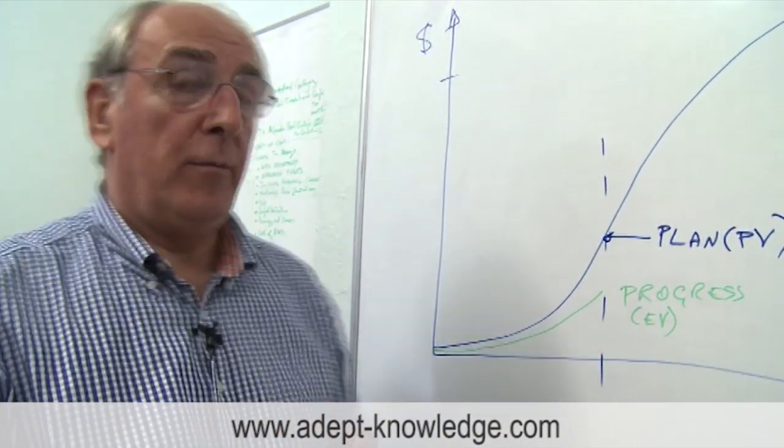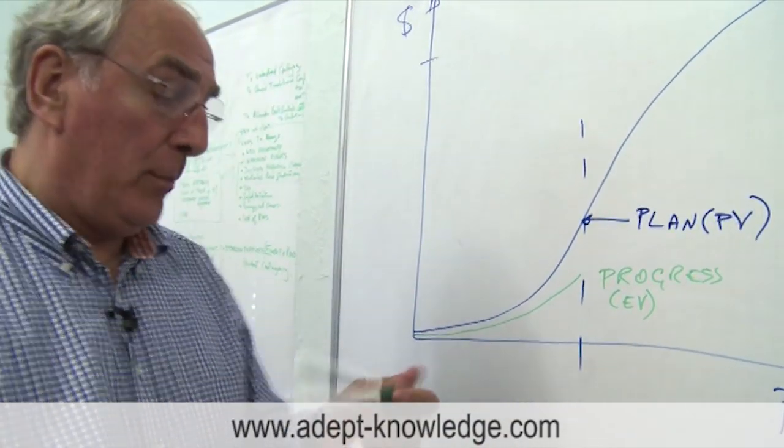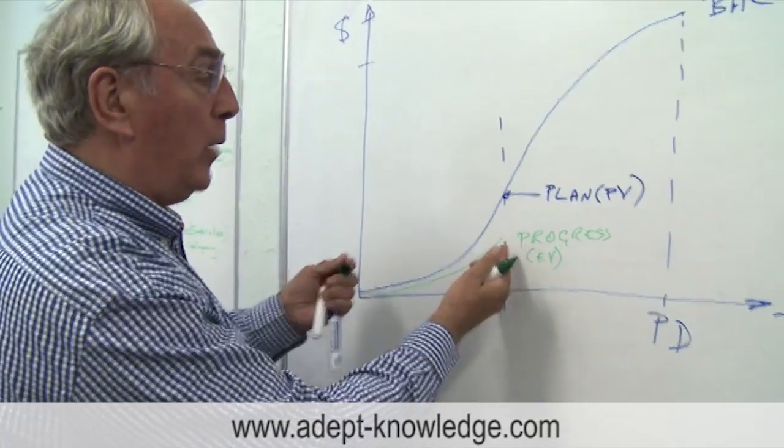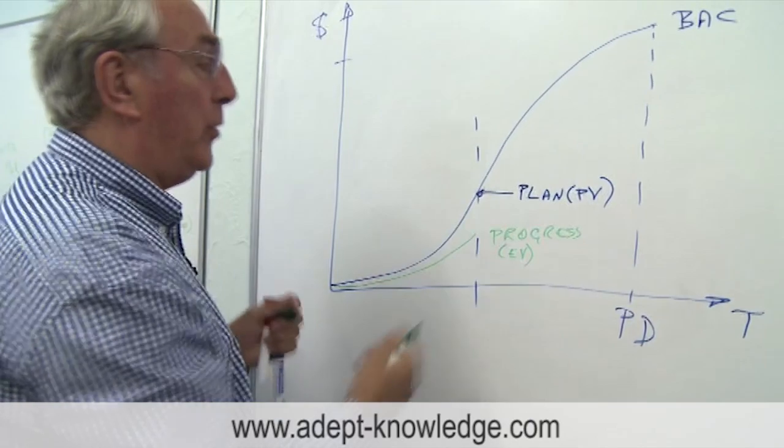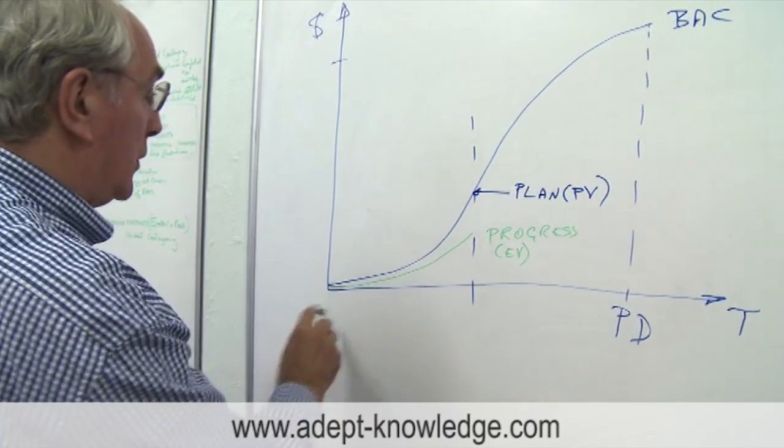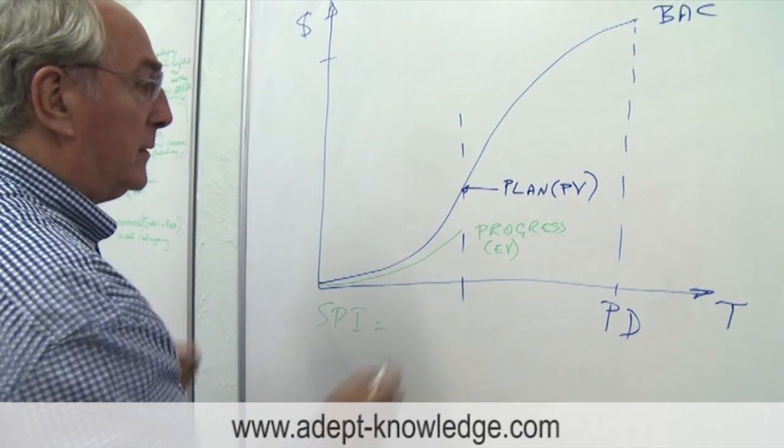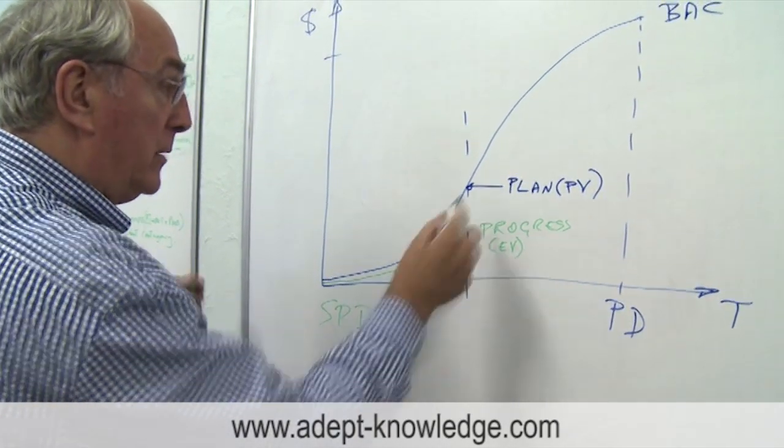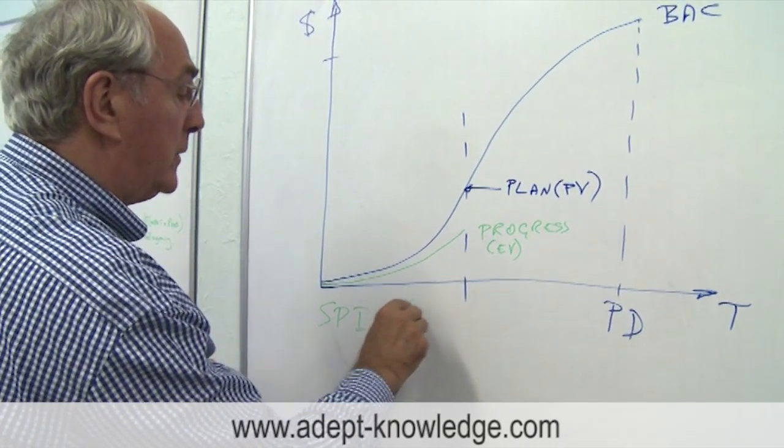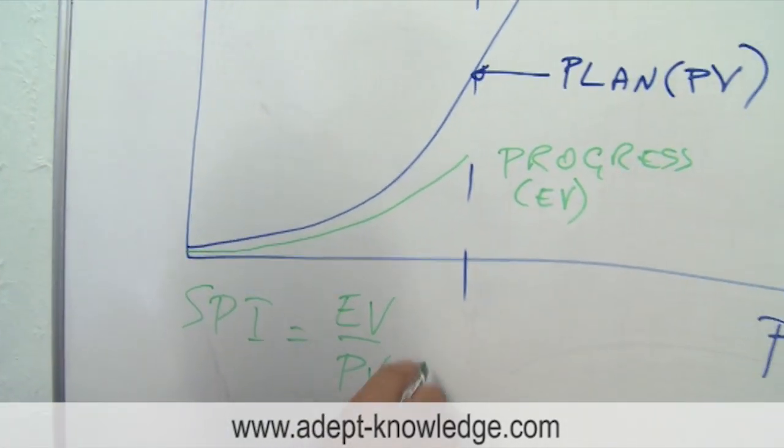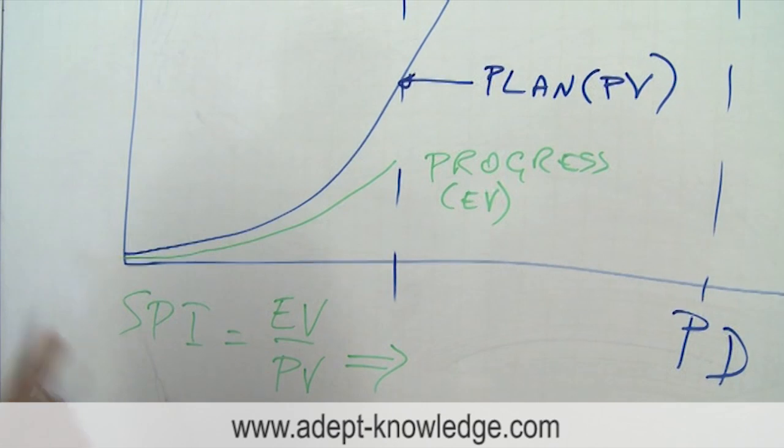And from there we can do some forecasting things. For example, by measuring an index of how well we're doing against how well we thought we were going to do, that's called a schedule performance index. And that simply is a measure of the progress divided by the plan, or we could say EV divided by PV.